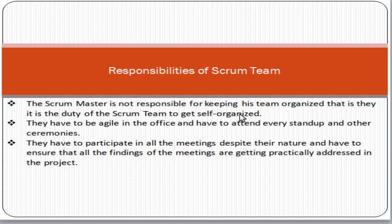Another responsibility of the scrum team is self-organization. The scrum master is not responsible for keeping the team organized — it is the duty of the scrum team to get self-organized. There is no head of department concept in the scrum team. Self-organized means they are self-motivated, self-decision makers, taking decisions by themselves and prioritizing things according to their own needs. The scrum master removes obstacles from the team's path, but the scrum team decides how they will deliver things.